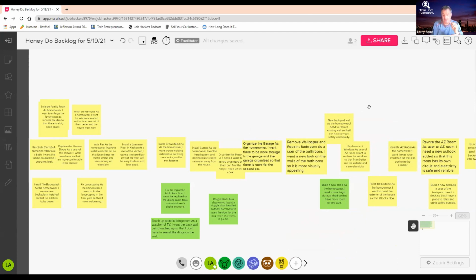For those of you familiar with how we do story pointing or relative effort estimation, we generally use something called a modified Fibonacci sequence. Some people are familiar with that, and I know my friends are going to put this in the chat. The modified Fibonacci sequence goes 1, 2, 3, 5, 8, 13, 20, 40, 100. These are different relative sizes. Why they use a Fibonacci sequence, somebody else will put in the chat as well. It has to do with things being significantly different from what precedes it, so that we have delimited columns.